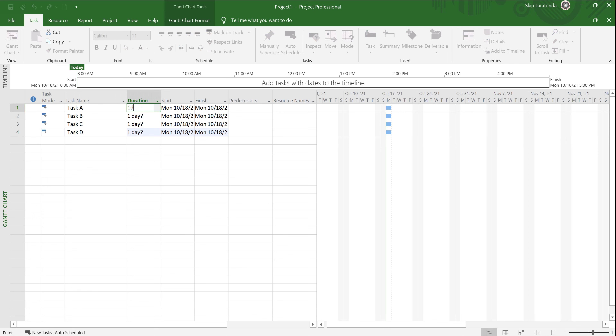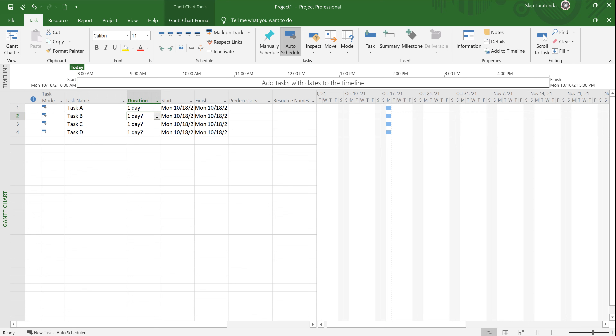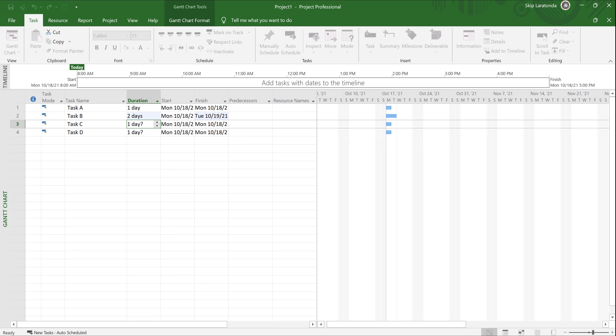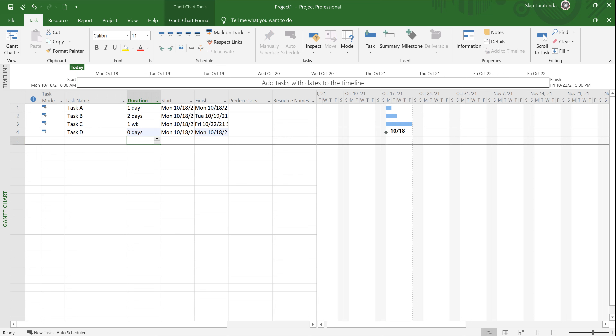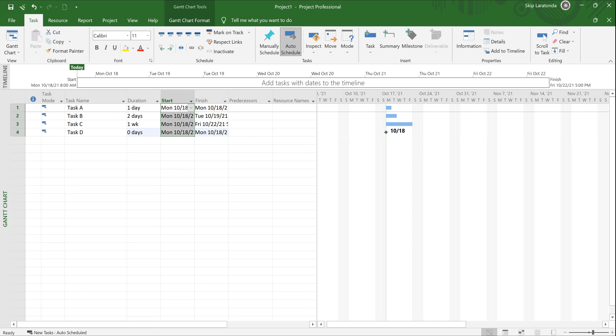I'm going to make Task A 1d and hit Enter; Task B, 2d; Task C, 1w for week; and Task D, 0d, and hit Enter. Notice the Gantt chart bars are all scheduled to start as soon as possible — today's date is October 18th, so all four tasks are scheduled to start on October 18th. Notice I typed zero days for Task D and it goes in as a milestone. I did not type any start dates or finish dates anywhere.